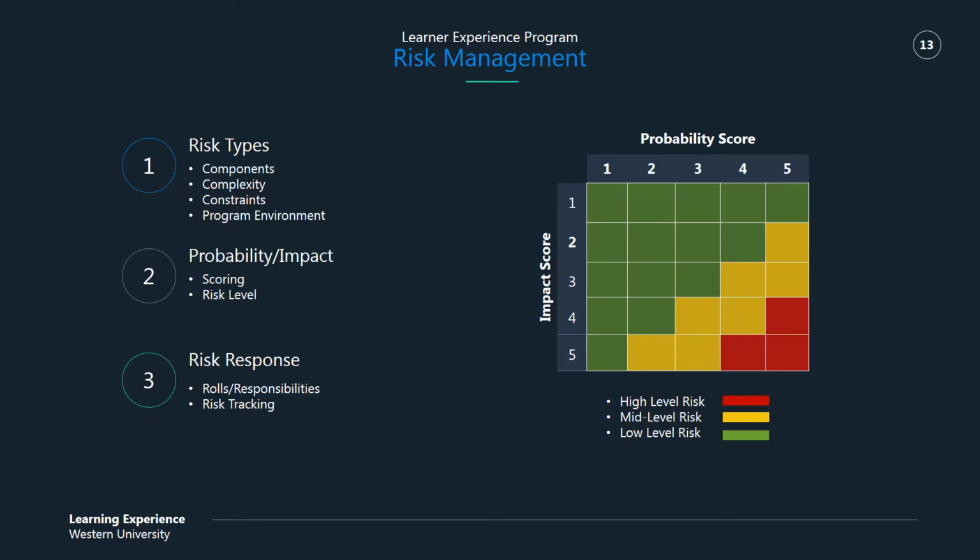Our probability impact. So the way that we score our risks, first our impact score, which is given a score of 1 to 5, and these go up in 20% increments. Sorry, not chances of them occurring, their percent cost increase.